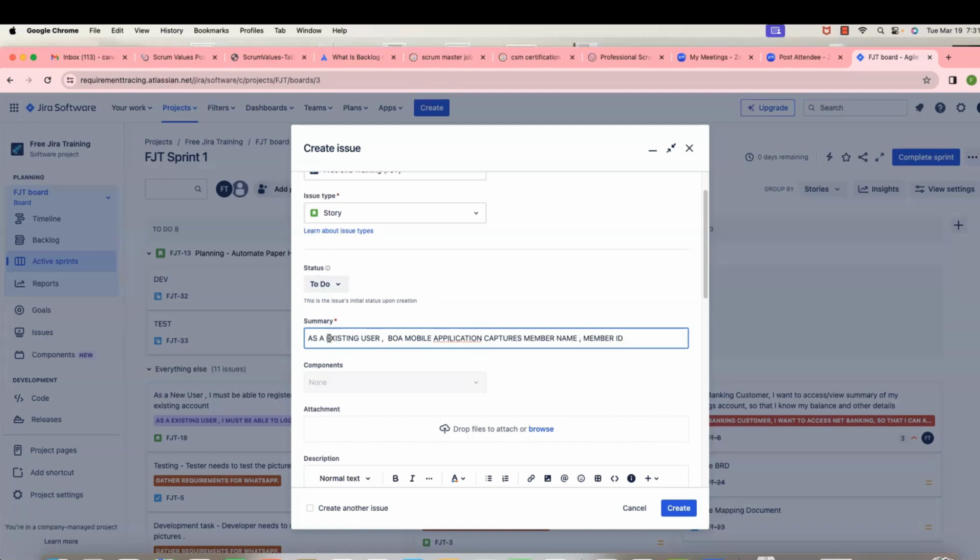You need to understand that on a very high level, the business is saying there's a check and our mobile application is capturing the data, but you have to divide that into small portions. Now it needs to be a valid check. How to do that? Either it reads some kind of barcode, or it captures your first name and last name. A check usually has some kind of member ID, so that needs to be captured. So step by step, we are dividing the whole project into small user stories.